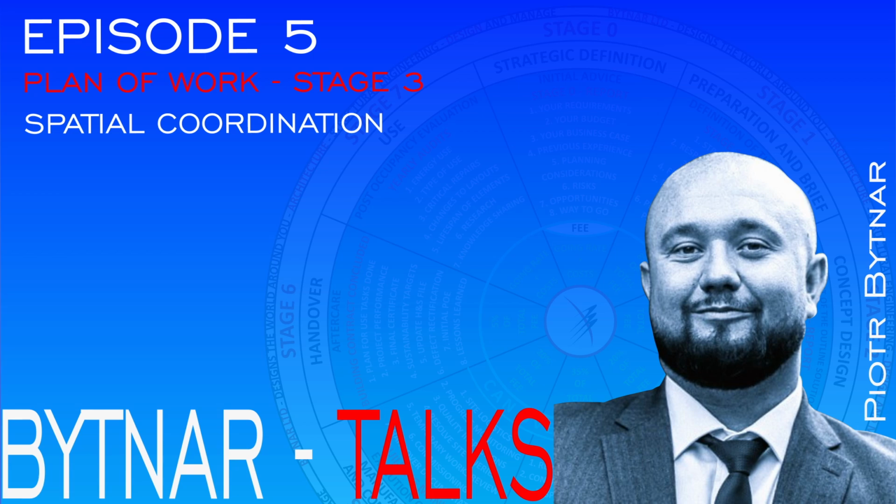Effective communication and collaboration between architects and structural engineers are paramount to achieving a harmonious integration of design elements during this critical phase of the project. This stage is all about reaching a consensus on major aspects of the build and making sure the proposal is as correct as possible, leaving only minor changes to be addressed at stage 4.